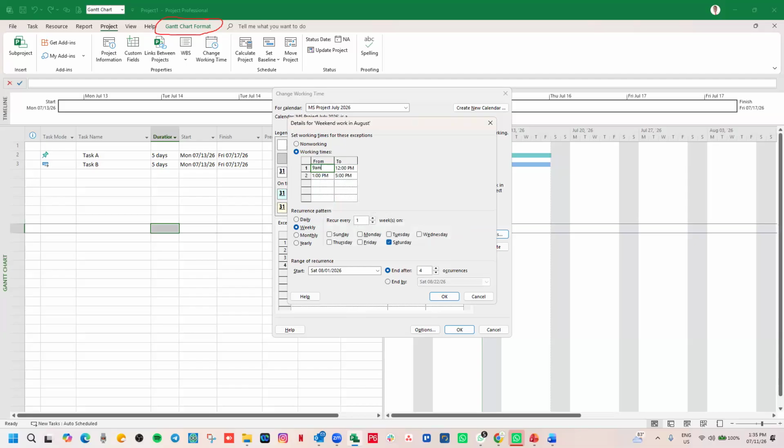9 a.m. to 12. And then I'll come back at 1 and I'll close at 2. So we work from 9 to 2. Now, you may not give the break, but the software will not allow you not to split it. So you can have it here and know that you work from 9 to 12, 1 to 2. But you work straight 9 to 2 without breaks when you go on the field.